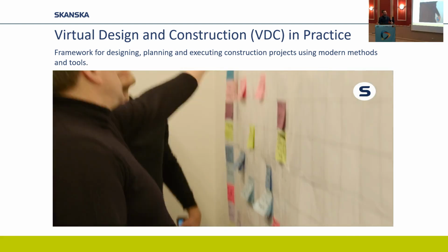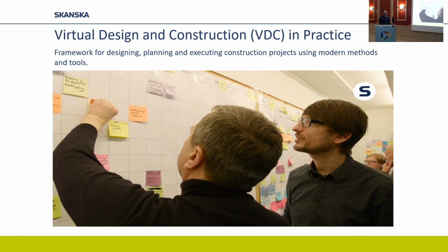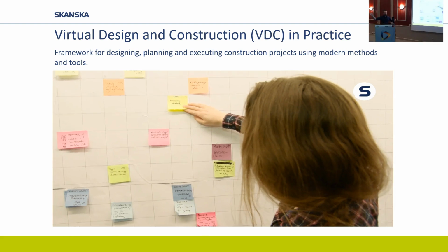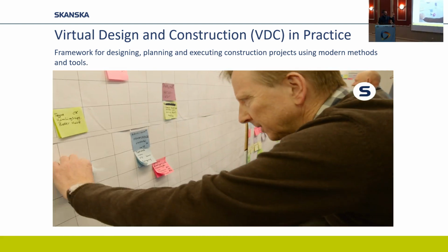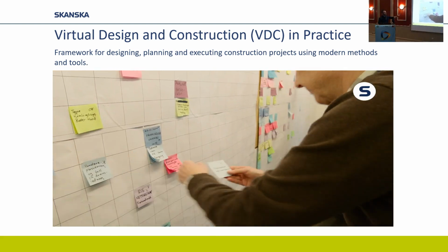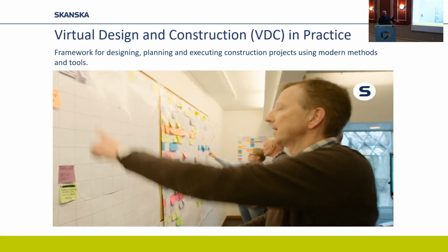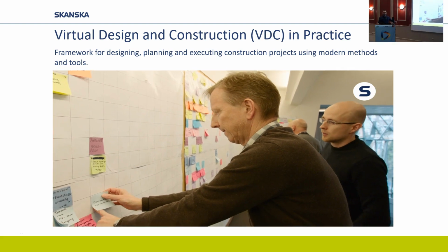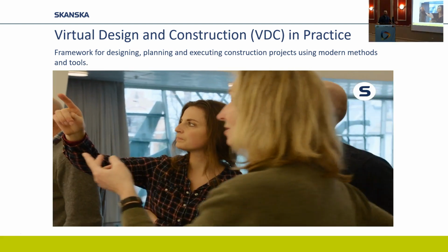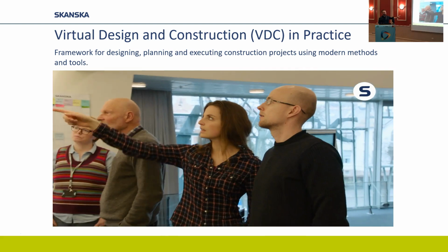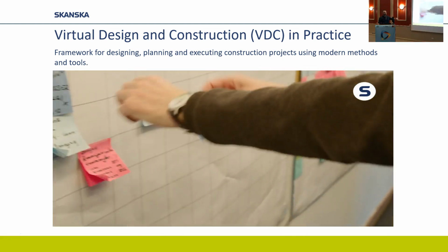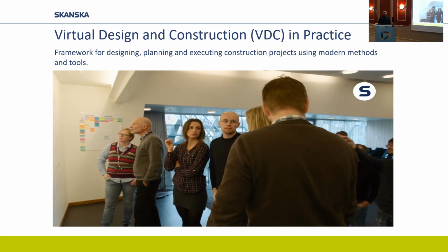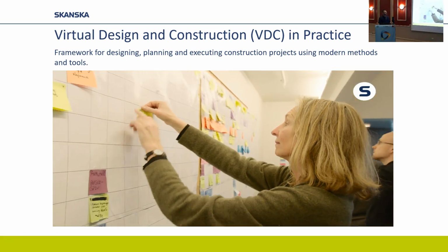So this is how we use last planner for a design team. This is a design schedule. So you see, it's not location-based. It doesn't have long strips of work and entire duration. These are just the delivery points of everything the design team does. So it's decisions, drawings, meetings, lists, BIM controls, everything that is a pre-construction activity, we try to get up on that map because we feel like those things need to be seen in relation to each other to really find the opportunities for improvement and waste removal.